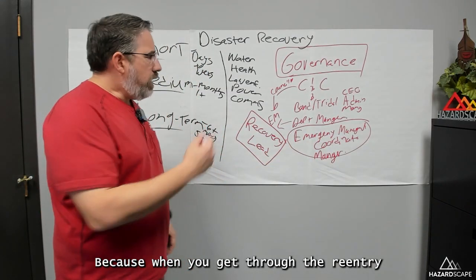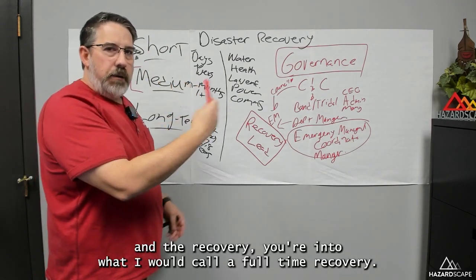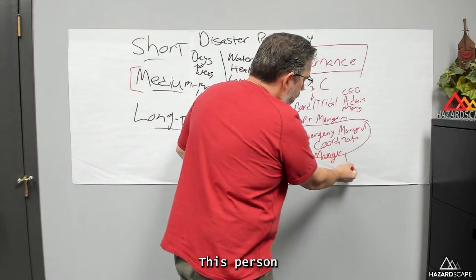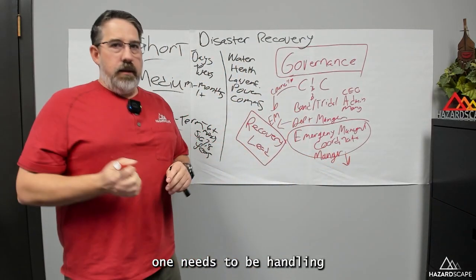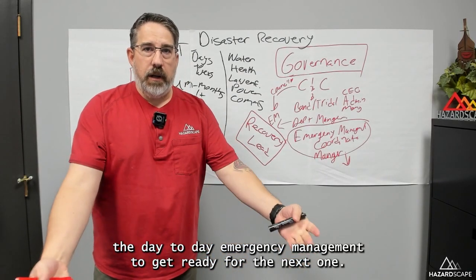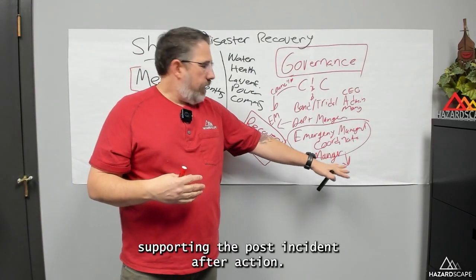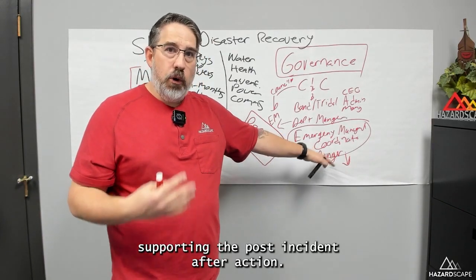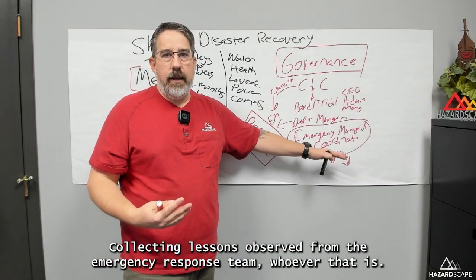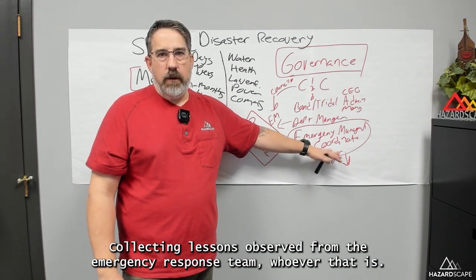Because when you get through the re-entry and you're into what I would call full-time recovery, this person, one, needs to be handling the day-to-day emergency management to get ready for the next one. They've got to be back into supporting the post-incident, after-action review, whatever you want to call it, collecting lessons observed from the emergency response team, whoever that is.